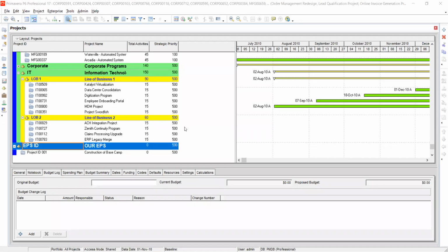Yeah, so we have said that in order for you to distribute budget on different levels or activities, it is better to distribute it from the top, and distribution of budgets is done by creating budget logs. In that case, you select the EPS, ensure that it is selected.